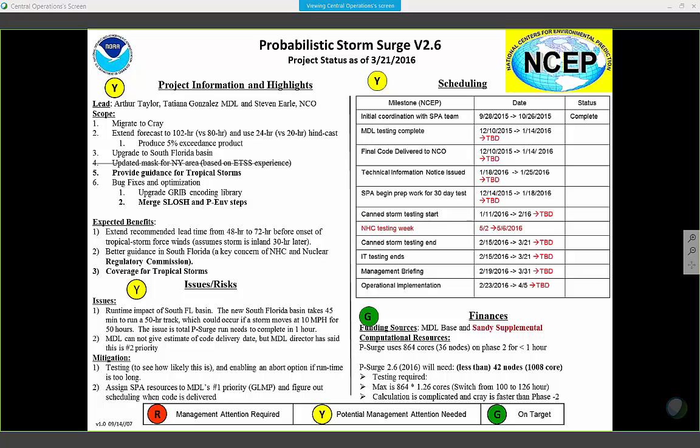Yeah, the yellow bar on the implementation, that yellow bar is long, right? So that means you're going to be spending? Yeah, because all the waves are supposed to come in June 1st. And then I think that's the typical 15 weeks. So, okay. If we decide to slip it, why not slip it another year? How's that process rolling out? We're slipping it until September. What if we slip it until next February to free up time? Are there other higher priority things in here that could use the attention?